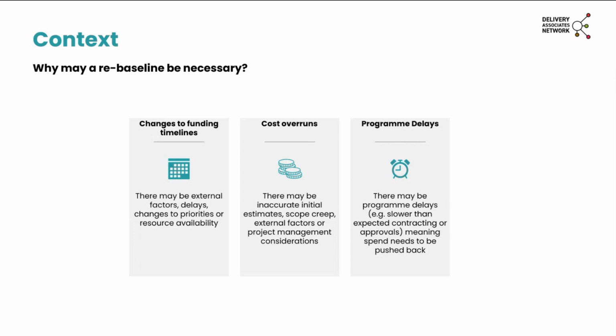Most commonly, I see that budget rebaselines are necessary due to cost overruns. Typically, this may be due to inaccurate initial estimates of the project budget or significant changes in the project budget over time that may be due to scope creep or also due to other external factors.